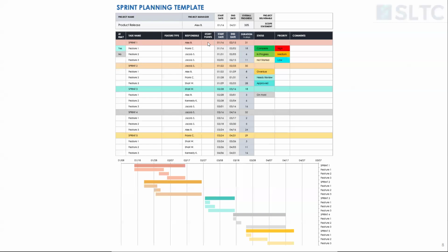You see, to develop the user registration, what is the weight of that? From, say, 1 to 10, how much effort is required? So user registration is a pretty heavy duty one. So I would put about 8 there. To view items, I don't think it's a big one. So I will put about maybe 3 out of 10.